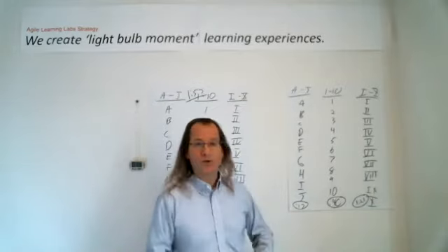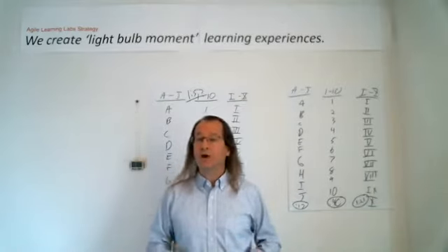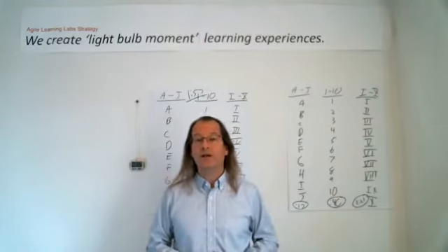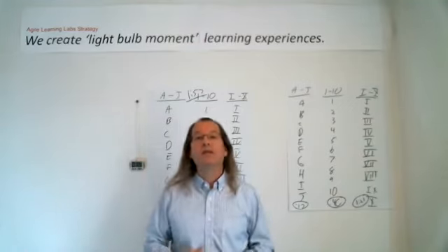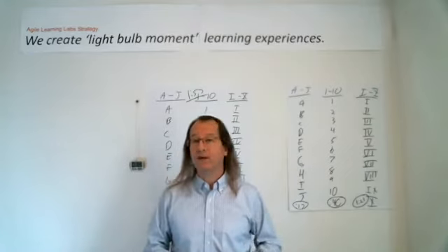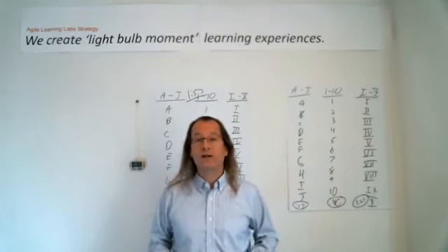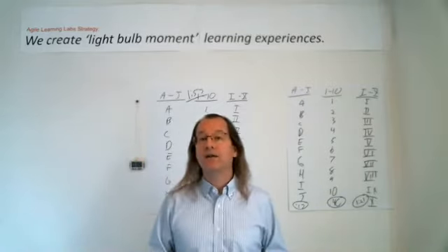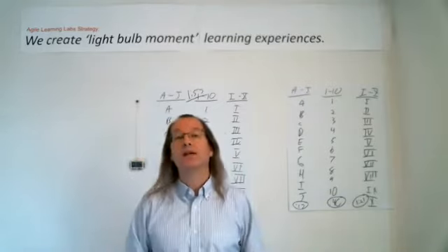And that was true. Now that we have Scrum, we have way better ways of giving our stakeholders feedback, right? Every sprint, we have a meaningful sprint review where we can show them finished product backlog items. Our product backlog is publicly visible, and so we can show them the rate at which we're getting through those.